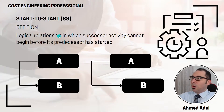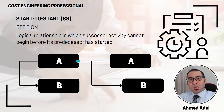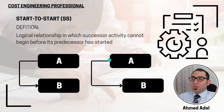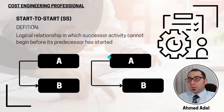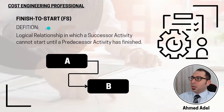The second relationship is start-to-start. This is a logical relationship in which a successor activity cannot begin before the predecessor has started. The start of the successor depends not on the end of the predecessor, but on the start of the predecessor. They can both start at the same time, or the predecessor starts first and after some time the successor starts.